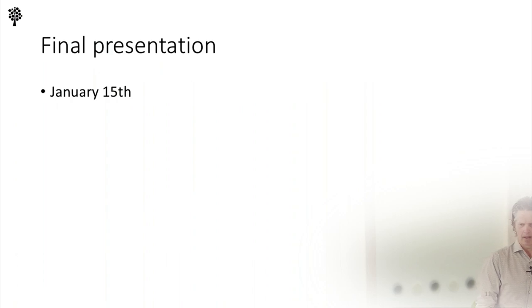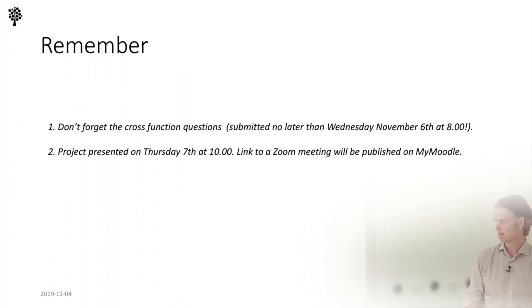And the sprint planning is something that is performed after the sprint review. Ola will talk about sprint reviews and sprint plannings and all that stuff and retrospectives. But when you have shown me what you've done, we will have a sprint planning, and that's when we talk about what you're supposed to do next week during the next sprint. So the review and the planning will take place at the same time, which is not that uncommon. And that's the same date as Ola had a few minutes ago. That's good.